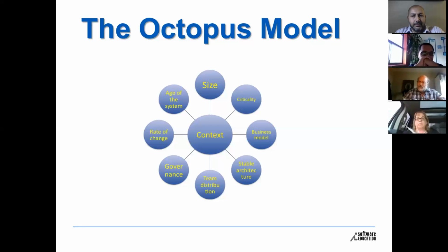What's the rate of change? What's the rate of change in the product, in the industry, in the business domain? One study I saw, and it was local to my region, Australia and New Zealand, said that the average period of stability of a business process today is about 90 days. The average duration of an IT project was 9 months. So if we got the requirements perfect, delivered exactly what was asked for, it took us 9 months, the fundamental underlying process has changed 3 times. Oops.